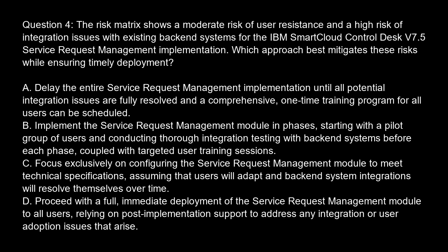Option A. Delay the entire service request management implementation until all potential integration issues are fully resolved and a comprehensive, one-time training program for all users can be scheduled. Option B. Implement the service request management module in phases, starting with a pilot group of users and conducting thorough integration testing with backend systems before each phase, coupled with targeted user training sessions.